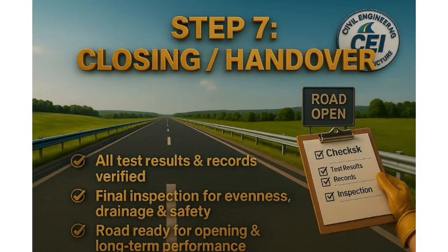Step 7. Closing or handover. The final step is closing and handover. All test results, quality records, and material approvals are verified. A detailed inspection is carried out for surface evenness, drainage performance, and safety compliance. Only after everything is confirmed as per specifications, the road is opened for traffic. This step also ensures that the highway is ready for long-term performance with minimal maintenance issues.